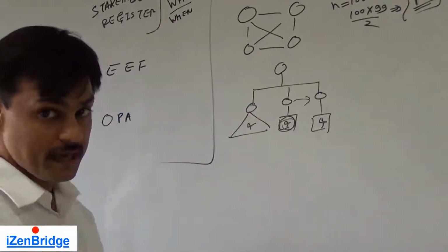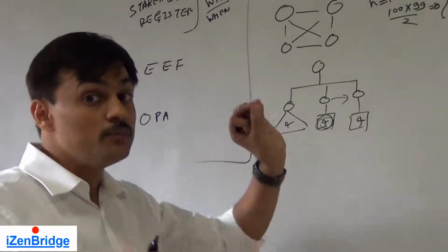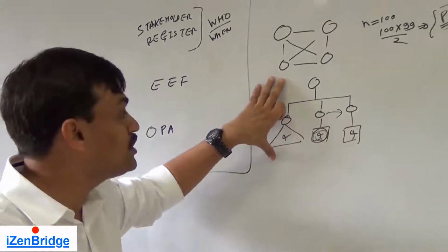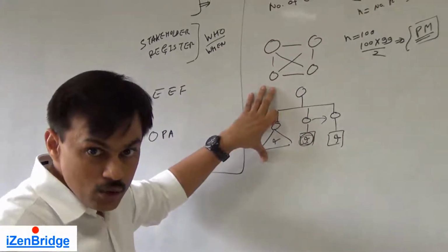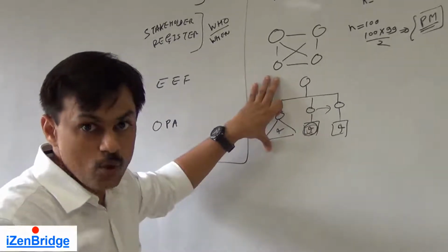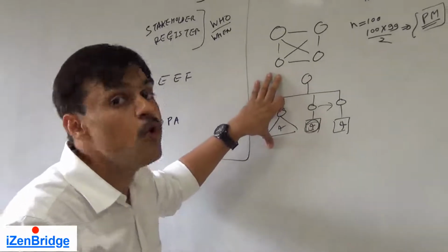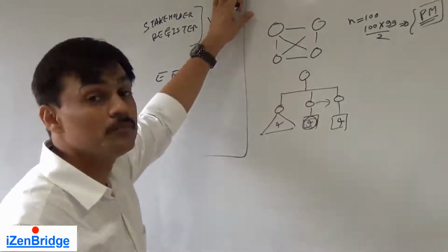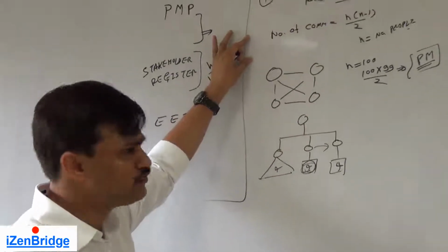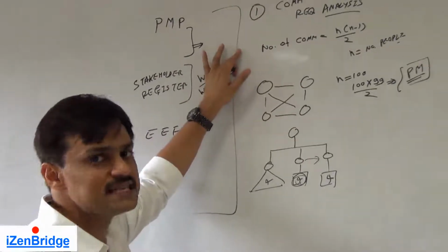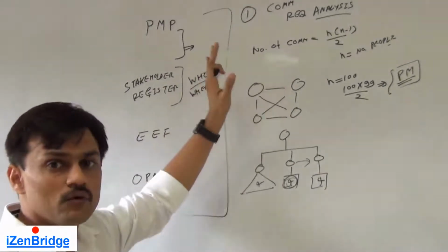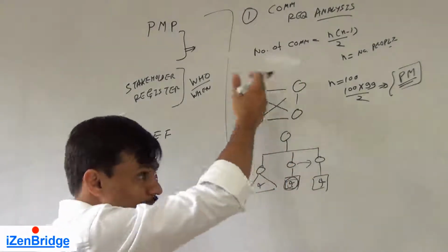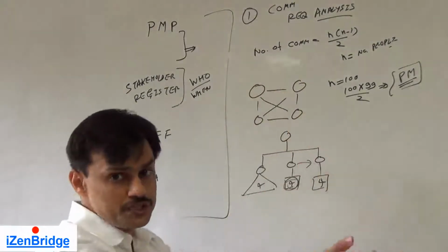So as a project manager, when you are making the communication management plan, you also need to visualize your communication flow hierarchy. Who can ask for status? Who can send the status report to whom? And this is driven primarily by the number of communication channels you have. If it's a very simple team, 6, 7, 10 people working in one project team, you may not need this kind of hierarchy. Anybody can talk to anyone and the project can get executed.